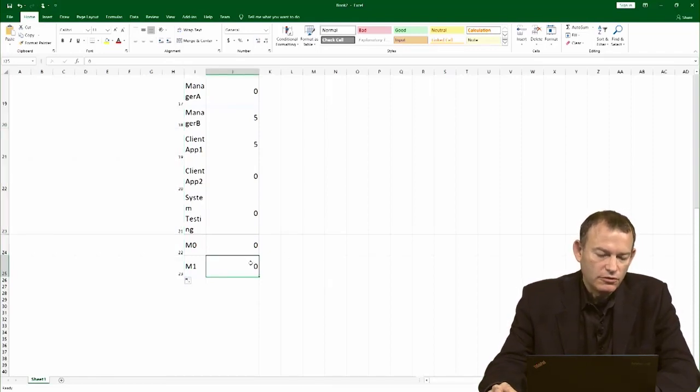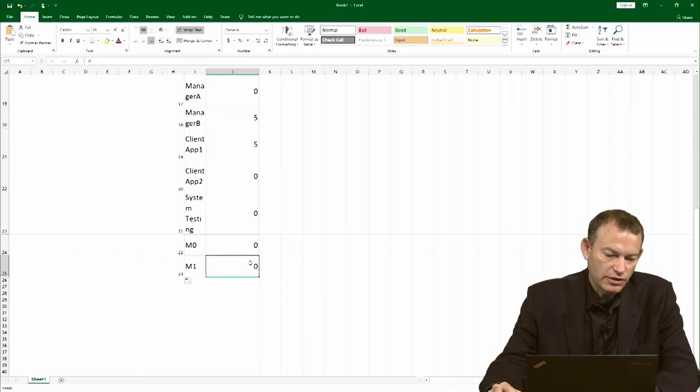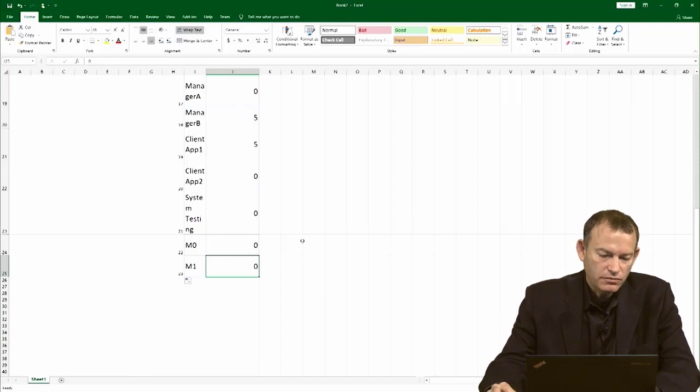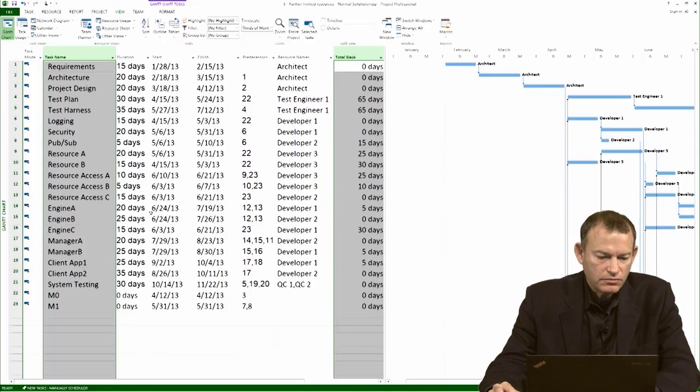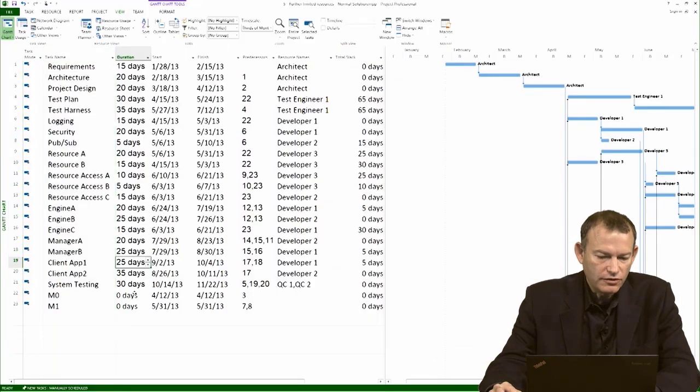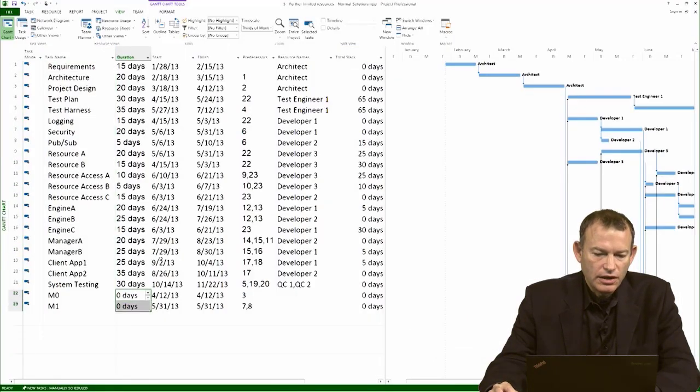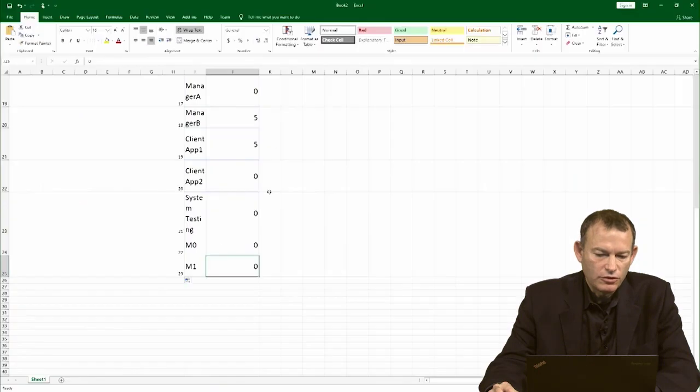Very important: when you're doing this calculation, you want to exclude activities of zero duration. In this case, we have our milestones, activities of zero duration. So it's important not to copy those.